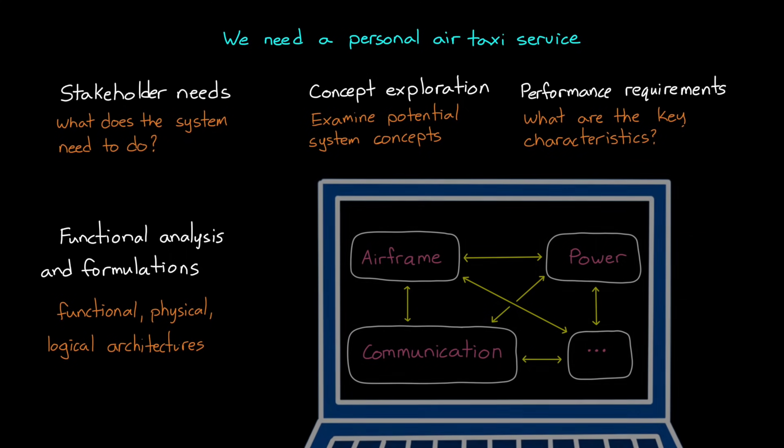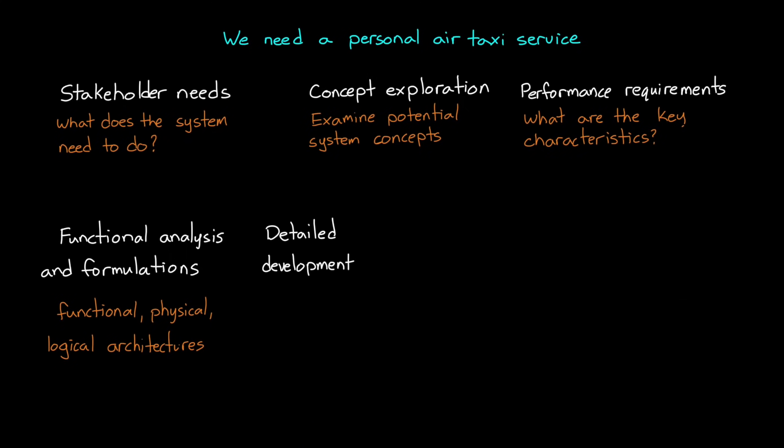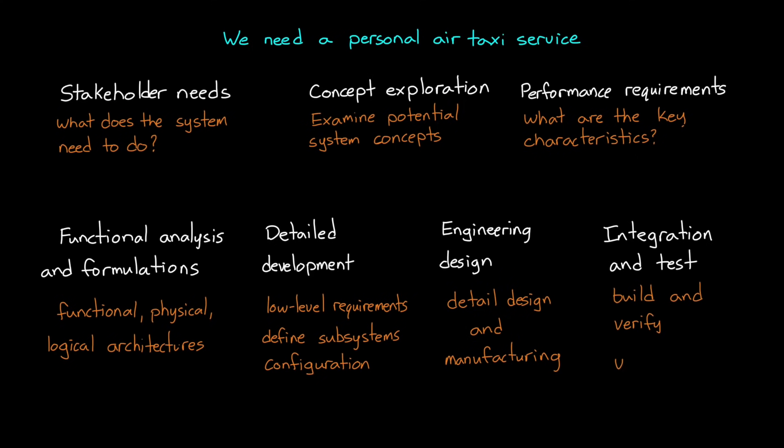If it's looking promising, we start developing the concept into something more concrete. We derive lower-level requirements, and we define subsystems, and start preliminary configuration, and we refine the architecture descriptions. And we continue to spiral through these tasks, providing finer and finer detail until we get to the point where we have enough confidence to begin detailed design and manufacturing. At that point, we begin the process of integration and test. And if we did the front-end work correctly, we will have minimized the number of problems and rework that needs to take place.